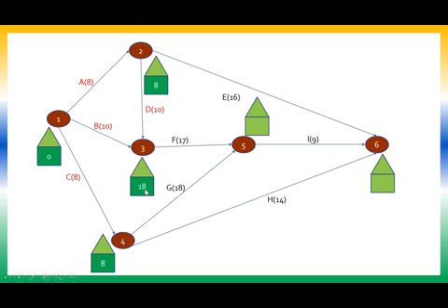So from here, I am supposed to move here. It is 18 plus 17, which will be 35, or 8 plus 18, which will be 26. So which has to be maximum? 35 is maximum, I write it. So 35 plus 9 will be 44, or 8 plus 14 will be 22. Then 8 plus 16 will be 24. Maximum of all the three is 44. So I write 44 here.